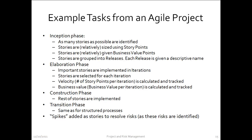This slide shows how the Agile methodology fits into the various stages of software development — inception, elaboration, construction, and transition. The initial grouping of stories into releases is the inception phase. Within elaboration, important stories are implemented in iterations. At some point all risks get resolved, and you enter the construction phase where you're simply adding features. As the release ends, it's handed over to the customer — that's the transition phase.